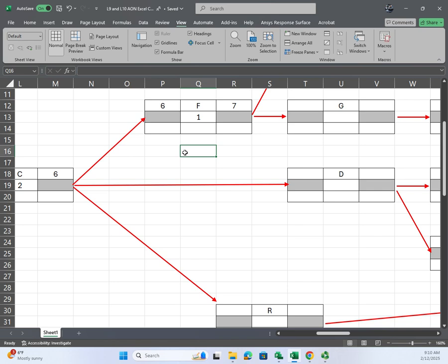And then we'll start looking at, well, so Kyle's starting, I'm going to make you the masons today. But you're the drywall guy. Well, if he's got half the building done, you can do the drywall, but you don't have to until he's actually done, because I've scheduled him to be completed before you get started. But you may have a chance to get on the job early. So I want to do that because it speeds things up.